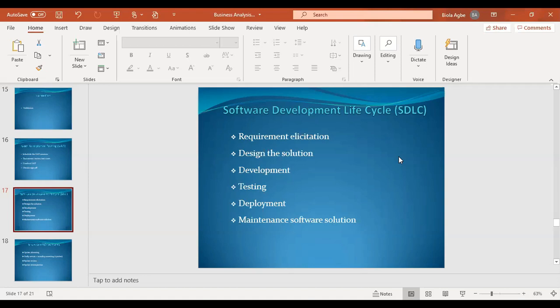There are so many things that they need to consider. And once this has been designed, different organizations have different boards that sit on their design. Some people will say technical design authority, some will say BDA, depending. So you may have a different team that designs the solution, and once that design has been agreed, then it will move to development. They can now start developing, and after the development, that's when the tester will start testing that product or system or application.